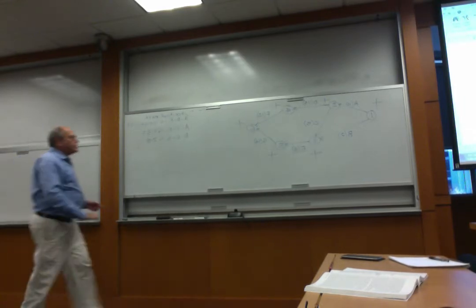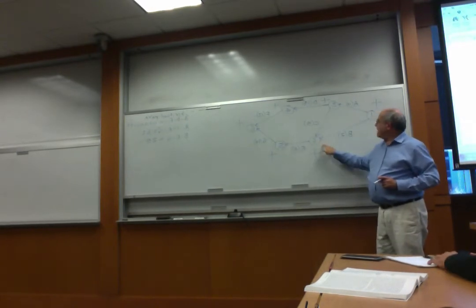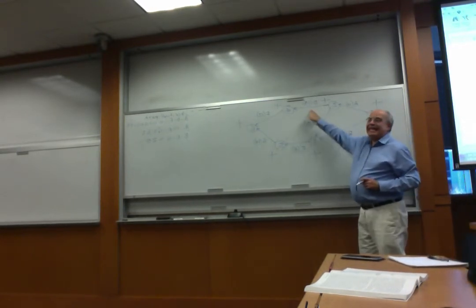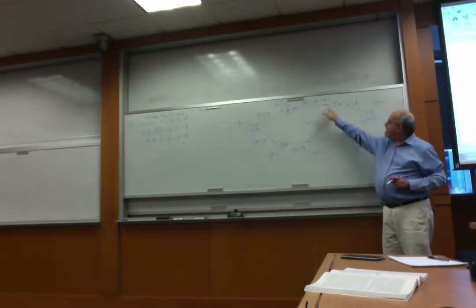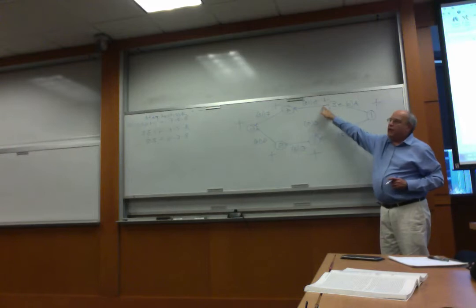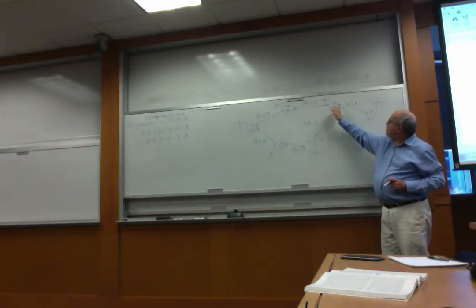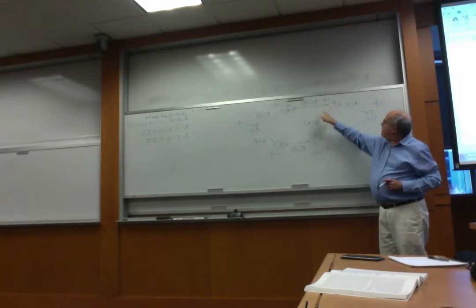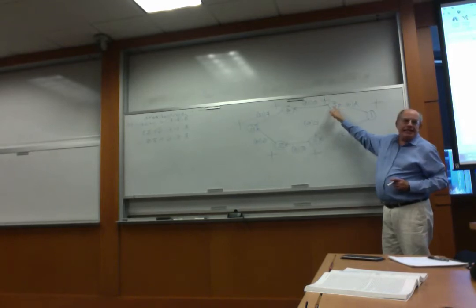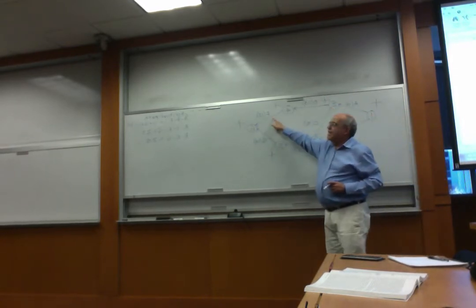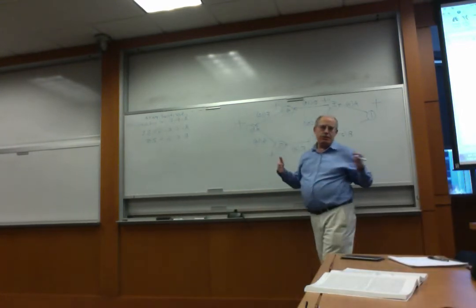So for example, here we say E can be started only when B and C are done. How about D? D can be started only when A is done. Somebody's going to say, why don't you need C before D? No, I don't, because C is pointing this way. If you look at 2, it is the ending of A, and at the same time the beginning of C and D. So C and D can start immediately after A has been completed. Same thing down there. When can we start F? Only after D has been completed. So that's how it works.